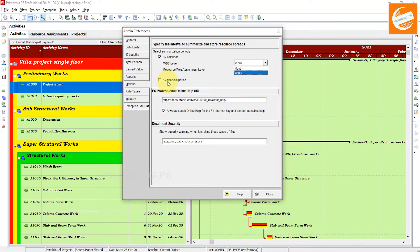For the 'By Financial Period' option, select this if you want to summarize and store activity and resource data in financial period intervals that correspond to a range of financial periods defined in the Financial Period dictionary. Choosing this option enables Primavera P6 Professional to accurately display all activity and resource data - both actual dates and past period actuals - in financial period timescale intervals.